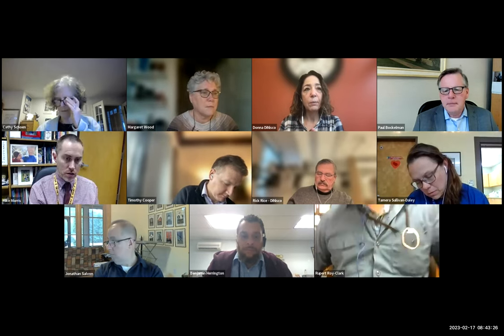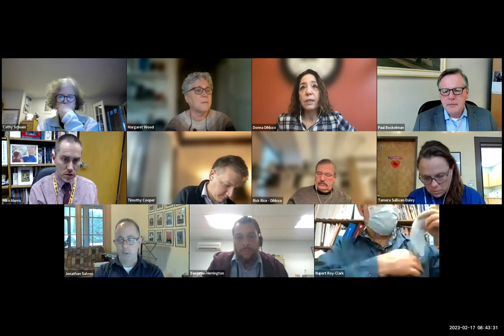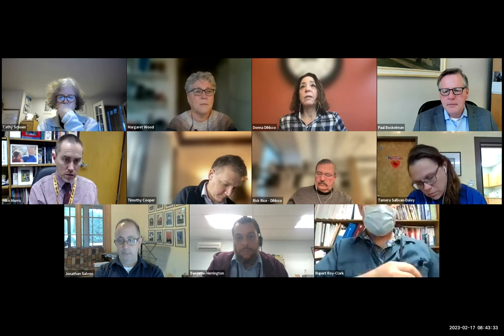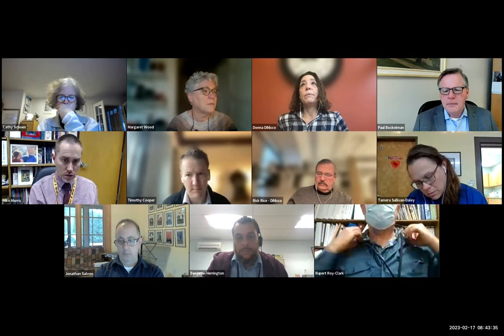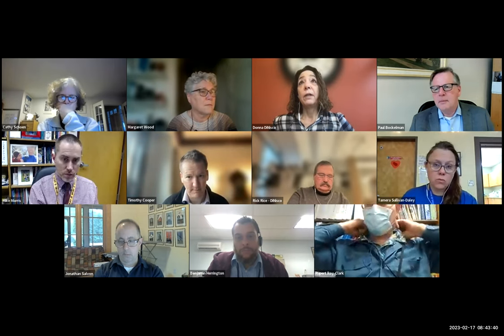Right, exactly. So the size of the building, the location of the building. All of those really significantly impact cost and the program. That's set in stone. We've submitted that to DESE, the Department of Elementary and Secondary Education. So the adjacencies and locations and sizes of the spaces can't change. We can balance a lot of the other elements within the scope.